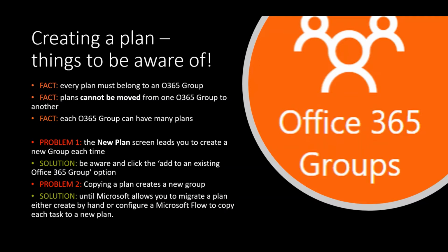So the first problem is that the new plan screen leads you to create a new group each time. So you just need to be aware and click the Add to Existing Office 365 Group option. And the second problem is that copying a plan also creates a new group.